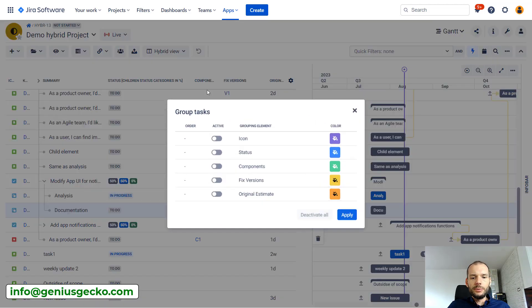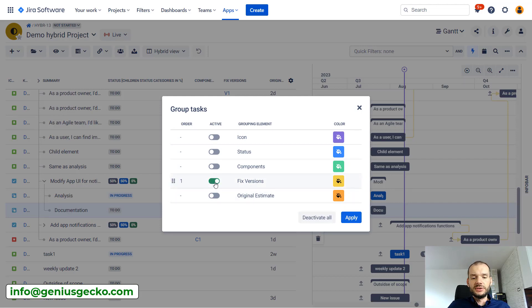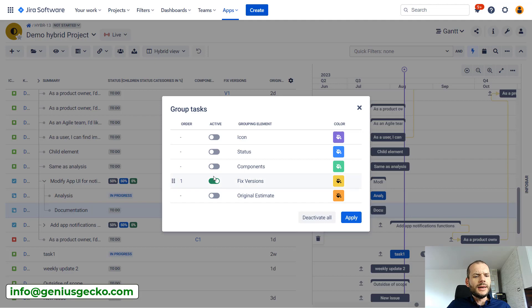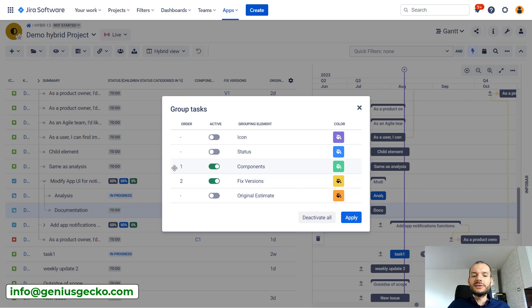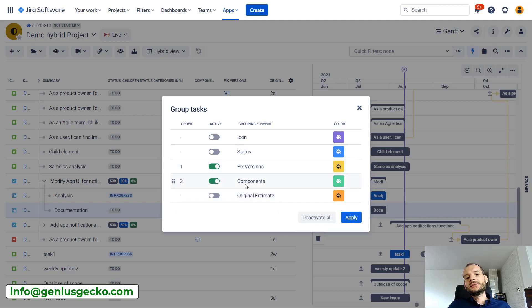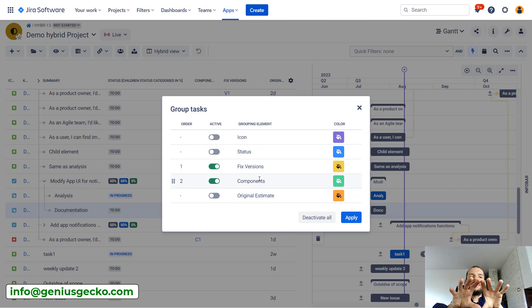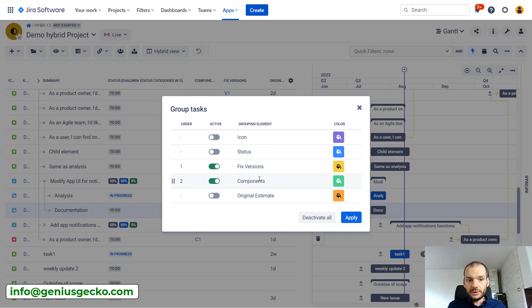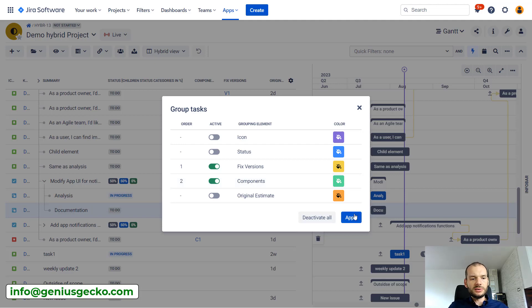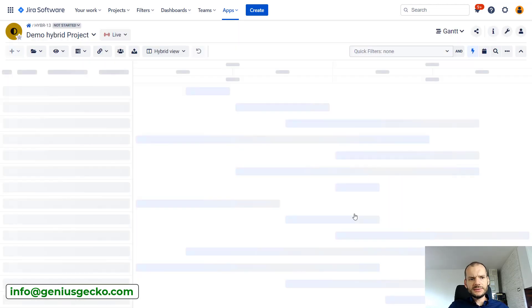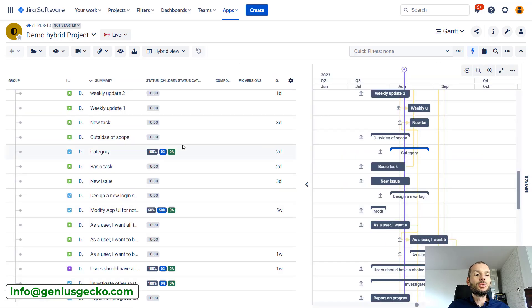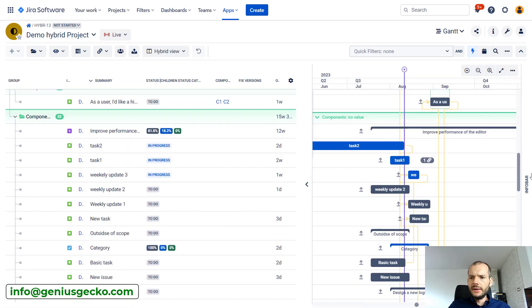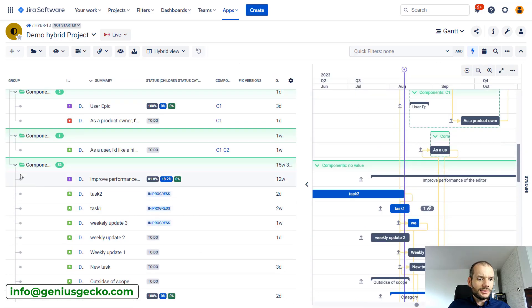So I will go to group tasks and let's do the grouping by the fixed version. This is what is interesting to us. Actually, just to show you, I will also do the grouping by component, but I will do it lower. So what we will have now is grouping by the fixed version on the highest level and below that, grouping by the component. I will apply this. Big Picture needs a moment to render this and you can see that